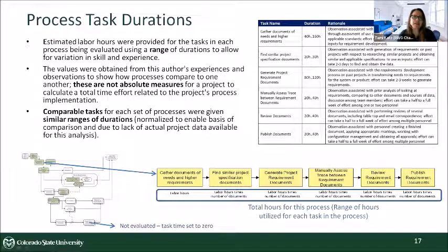If you got these 5 documents and we've got to kind of make sure all of those get worked for a project, those activities may occur 5 times. And yes, there's probably some refinement, and maybe some will take more and some will take less. But the idea here is you're doing it 5 times, and within that range, something will predict what your ultimate task count would be in terms of hours. So that's one of the measures that I use during this, is to figure out for each of the proposed processes, what are the task hours associated.